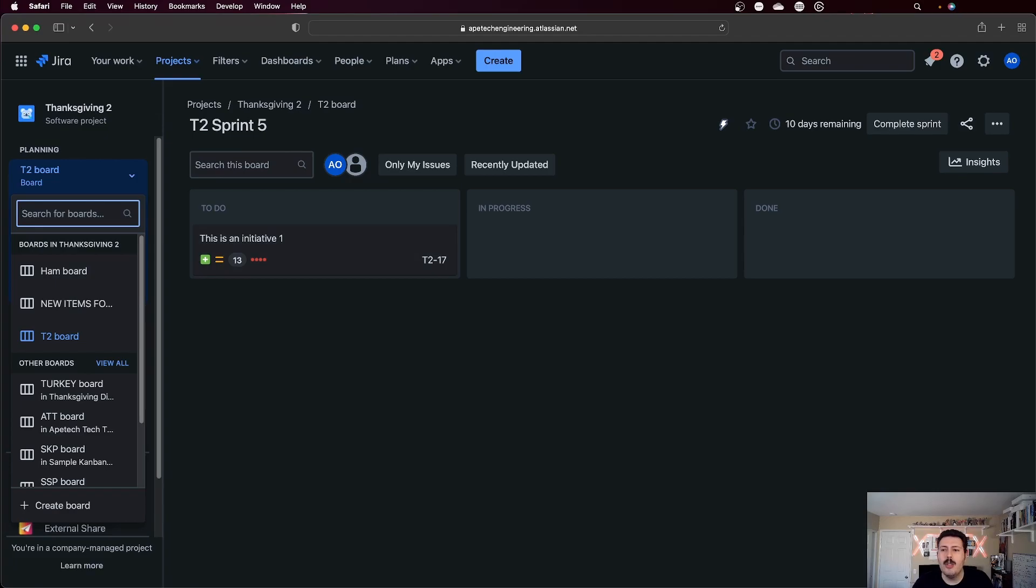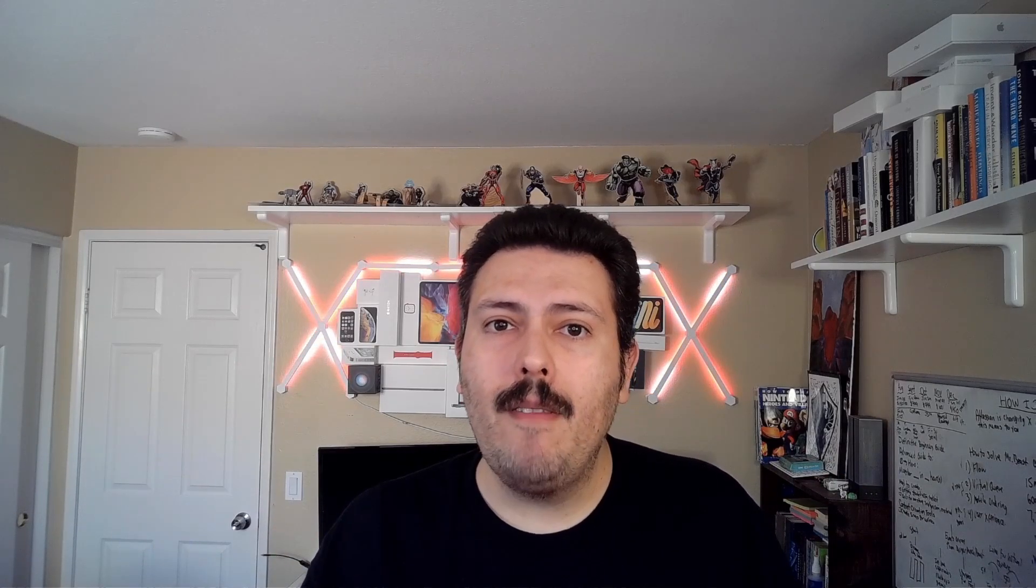And so to do that, my recommendation is when you are creating your filter so that you can basically segregate. Because the other thing you've got to consider is when you create multiple boards in Jira, they all inherit the same filter. And that same filter is show me every issue in this project. But that's not good because what's the point of having three boards that show you all the issues. It doesn't make sense. You're going to have three carbon copies. That's not the intent. The intent is we want to create rooms. We want to create dedicated rooms with specific criteria that basically say, hey, you belong there and you belong there. And what we're trying to avoid is for one issue to be in two places at the same time.